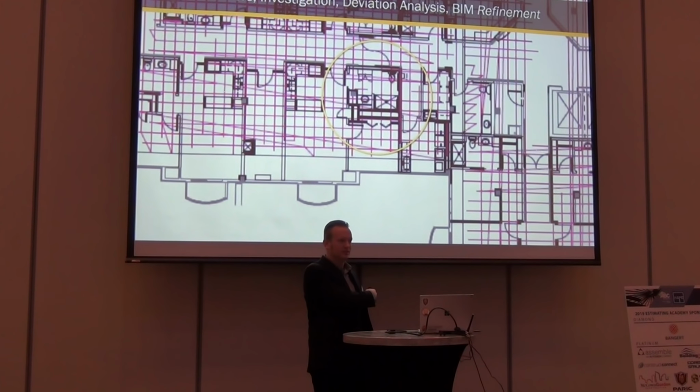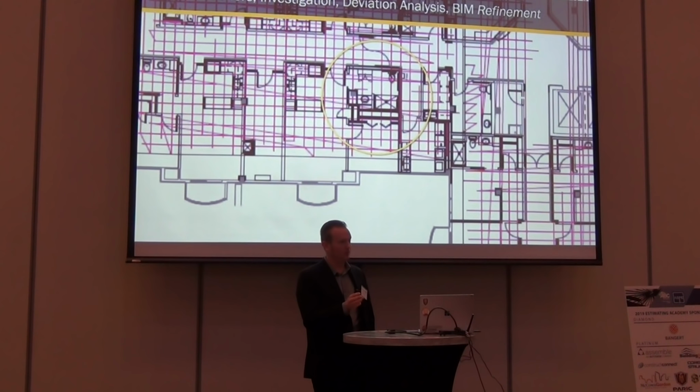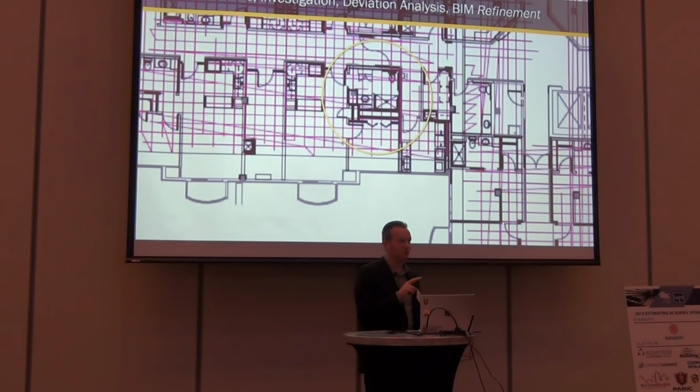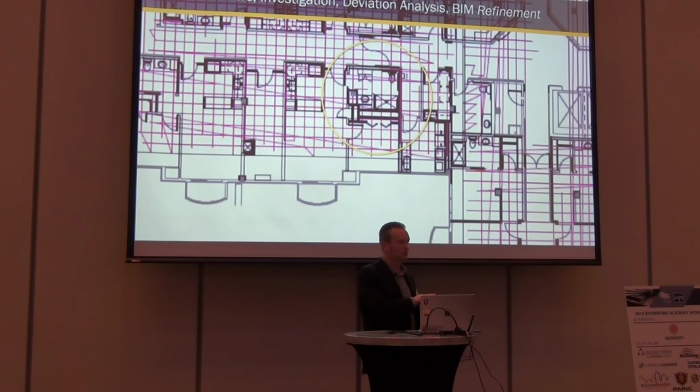And this building was from the 60s, so they were 50 years old. Concrete was well cured. And we ultimately had to cut 2 cables at the completion of this project in total. 2 cables. And I guarantee you, that everybody was a little nervous that day.